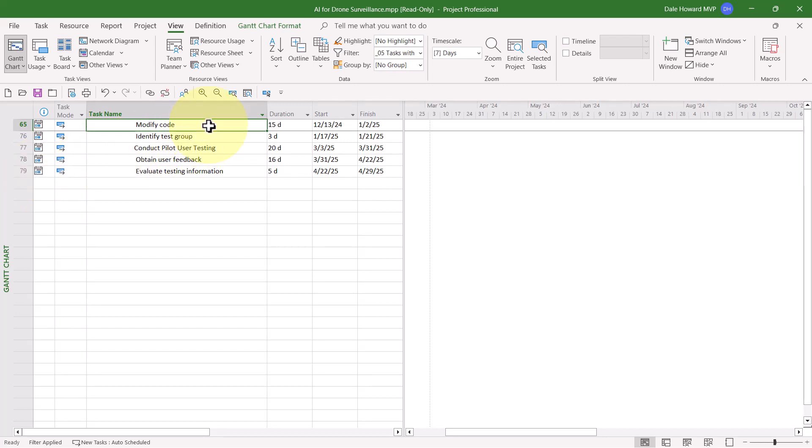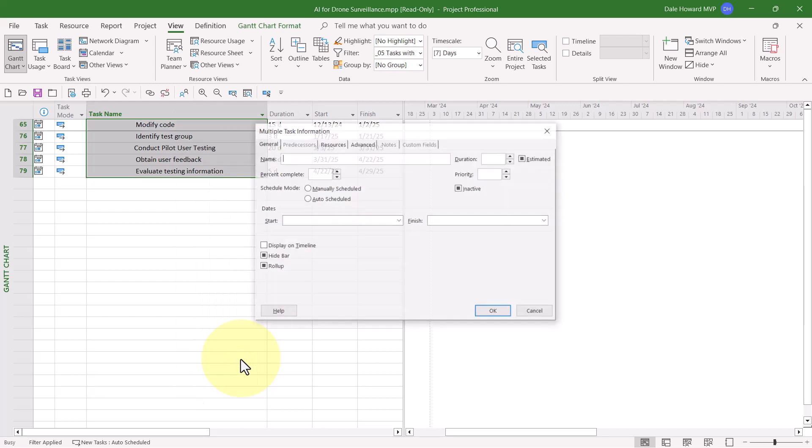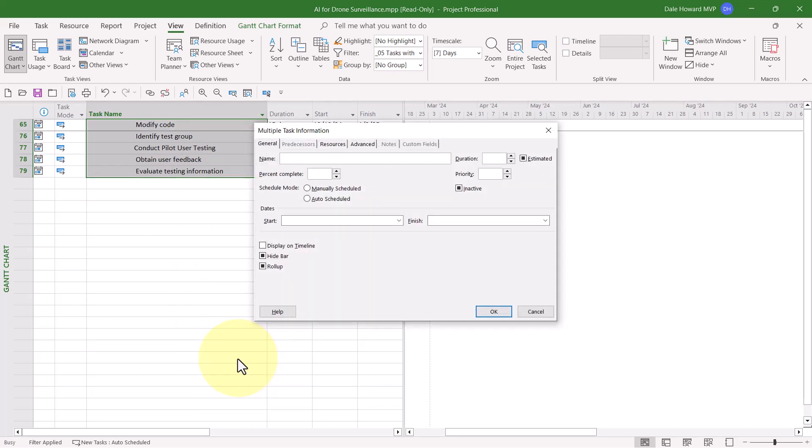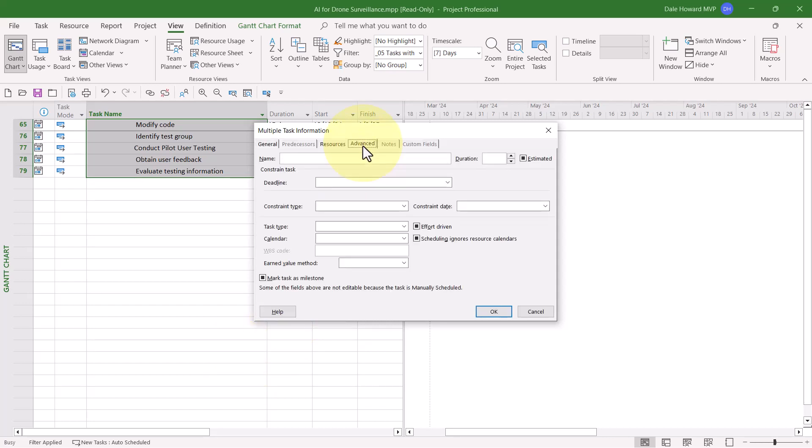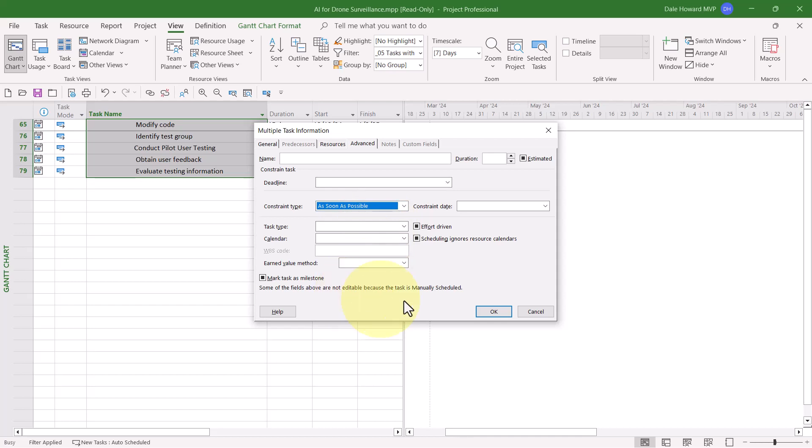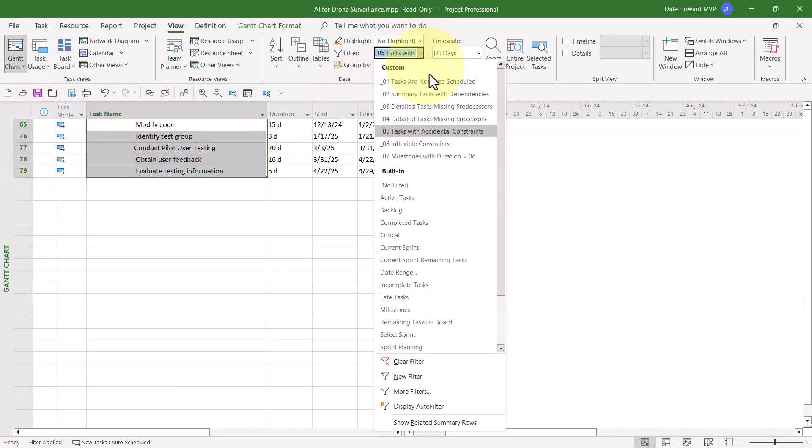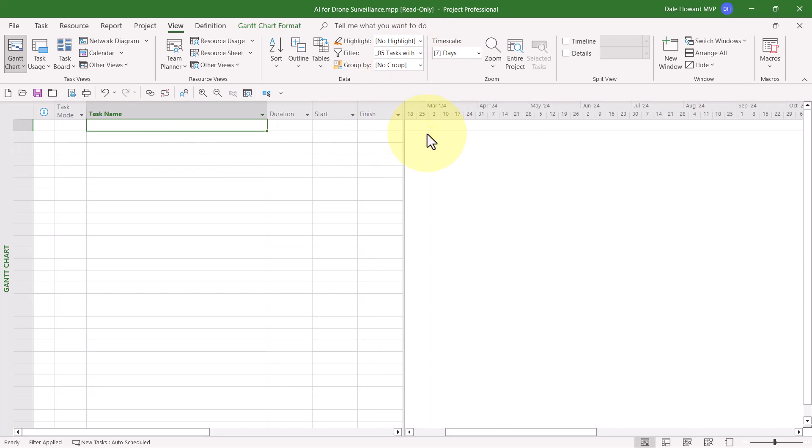So here's how to do it. If this filter returns any tasks, highlight the block of tasks, right-click anywhere in the selected block, and choose the information item on the shortcut menu. Microsoft Project will display the multiple task information dialog. In the dialog, click the Advanced tab. Then go to the Constraint Type Pick List button and choose the default constraint, which is called as soon as possible. You don't need to do anything else. Then go ahead and click the OK button. Looks like the constraints are gone because the Indicators column is now clear. So let's go ahead and test and make sure we've solved the problem. I'll reapply the filter. There we go. A blank list is returned. No problems remain of that particular type.